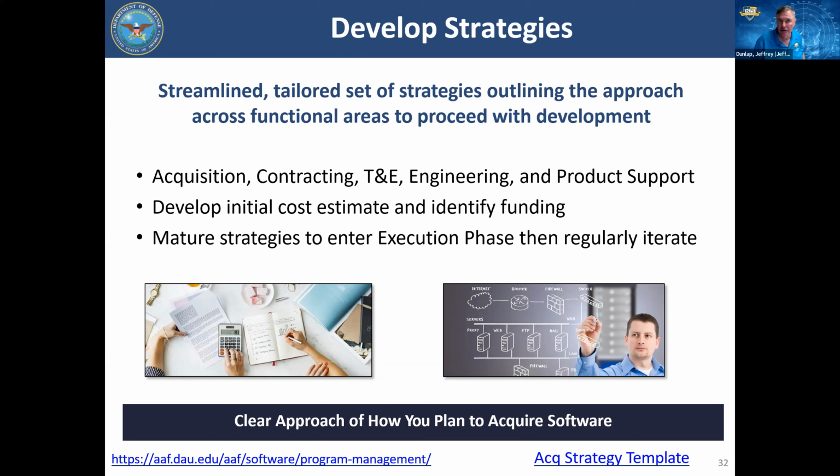When is the president's budget due to Congress for 25? February. Yeah, February. Guess what? When does fiscal year 25 supposedly start? October 1st. So if you want money in 2025, it's over, right? That budget has already sailed. We are working on 26, 27, right? Identifying funding is a non-trivial event. They understand this. They've actually made recommendations for Congress to provide a slush fund. I hate to use that word, but a pot of money set aside for the unknown stuff like this that requires some sort of seed money to get started and go through. So we have a big problem on that.